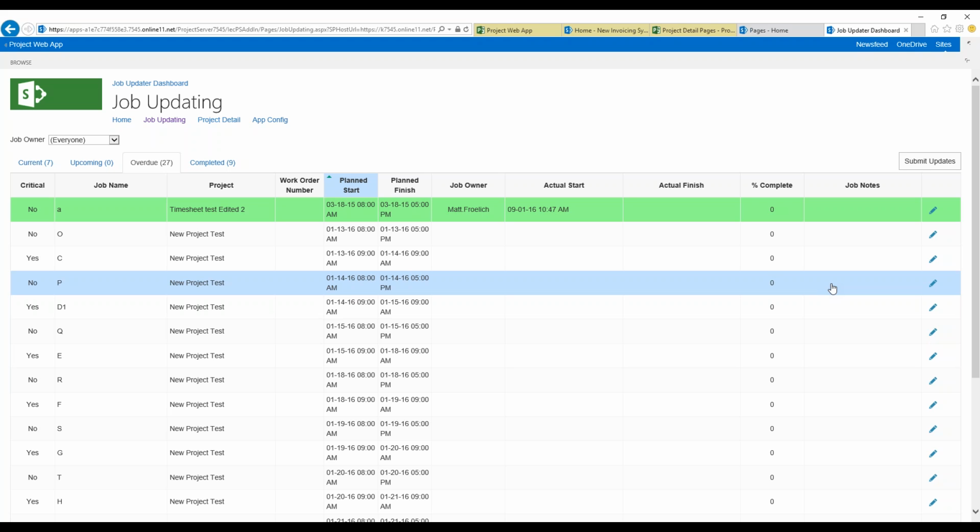So that looks like a much simpler way to do the updates than would have to do out of the box, right? Right, because normally out of the box, if I had a job that had 4 people on it, I would end up with four different assignments. This way I'm just updating 1. I don't have to update all 4, I just update the 1, but I can still keep 4 resources on that task.